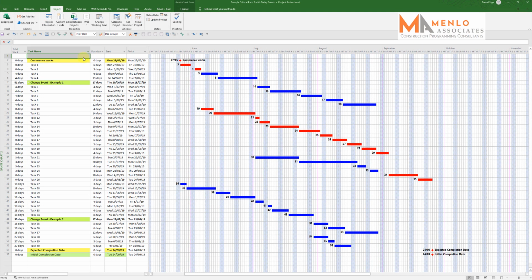The programme is the life story of the project. So anything that changes the story needs to be recorded in order to show the effect. The reason why is very simple. Change costs money, and if the project takes longer to complete, you increase both cost and risk. Cost of running the site and risk of not getting paid for it, plus the risk of having to pay penalties for a late finish. Consequently, getting the story right can mean the difference between being the one receiving the payment and the one making the payment.